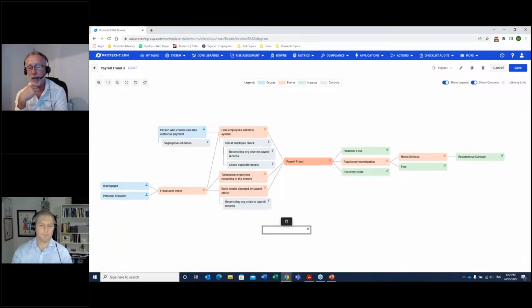I mean, just write any garbage in there, it doesn't matter what it is. And then once you've got the sticky label, you've captured that thought in the workshop, as Michael quite rightly said. And then you can, at the appropriate time, just bring it up to the right place in the bow tie. And that is a classic method to capture the conversation without stopping people because you aren't in the right spot. And that's something I would suggest you practice. What I call a sticky kind of label wall.